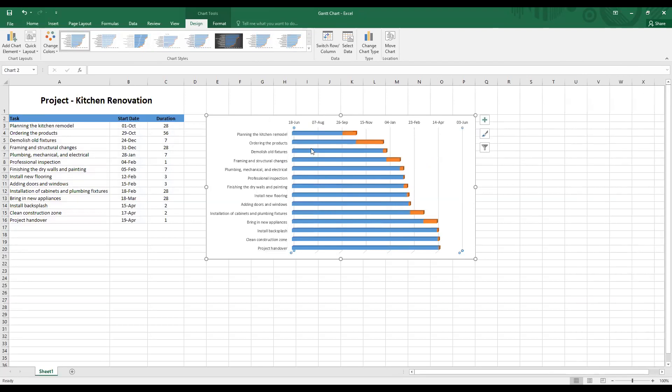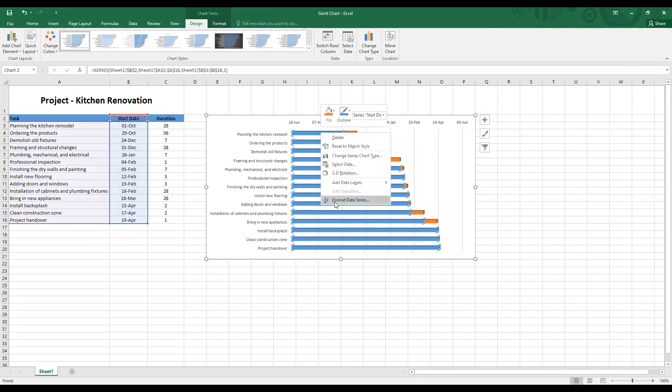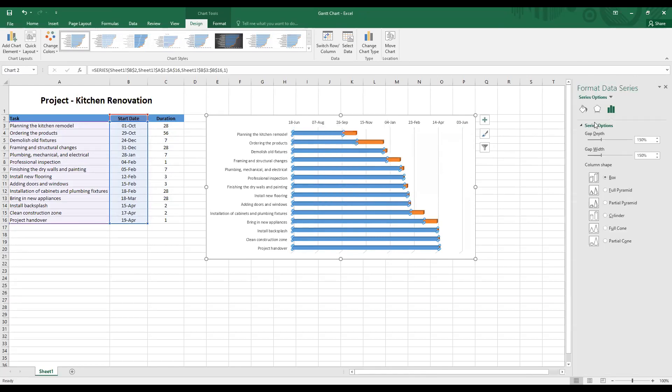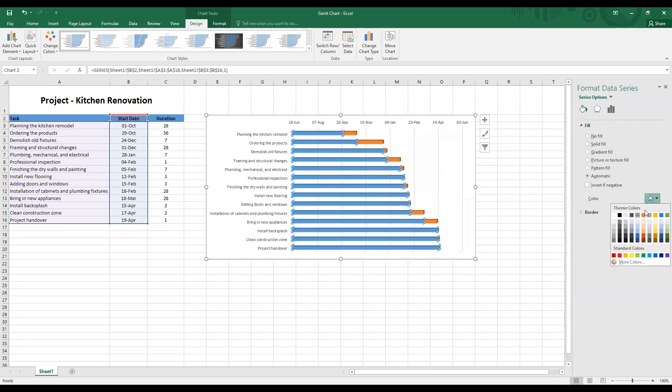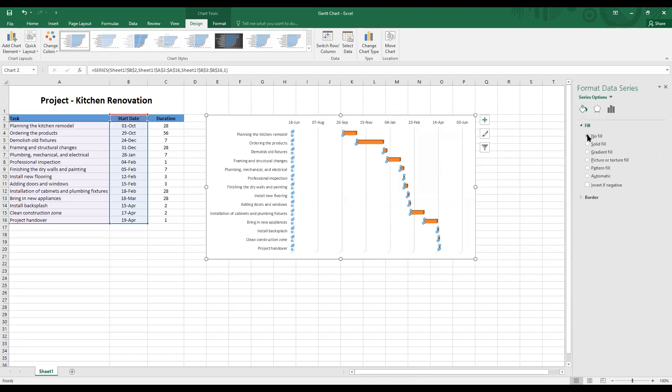Next, let's fix the blue bars. Right click on the blue bars and format data series. And then select the fill and line option, the bucket symbol. And right now the color chosen is blue. We will go to no fill, check this box, and you see that the blue bars have disappeared.